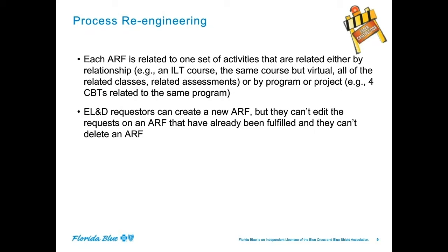EL&D requesters can create a new ARF, but they can't edit the requests on an ARF that have already been fulfilled, so they can't go back and change things. Let's say, for example, we have a class that starts on a certain day and time. If they want to change the day and time, they can't just go back into the form and make the change and submit it. They add a new request row saying that they're changing this activity, and they put in what the new date and time is, and then we know what needs to change.